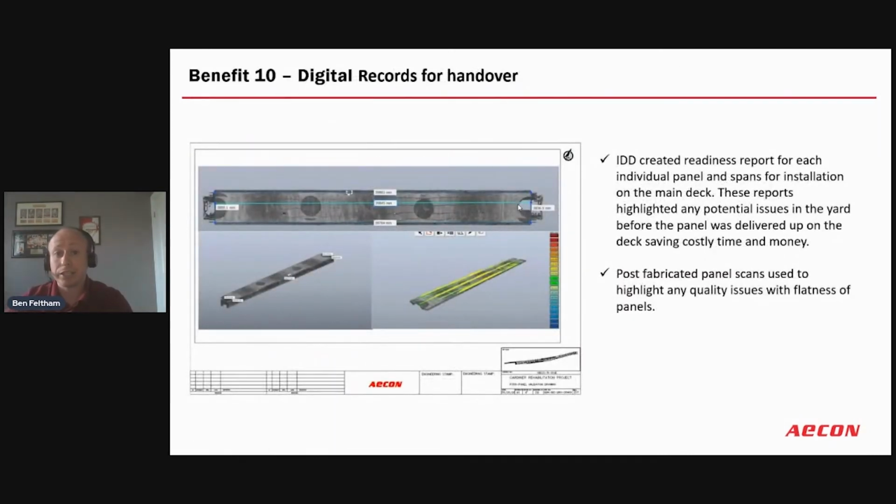And then the validation. I still believe in producing a good drawing that comes from that data set, that's easy to understand, that's coded properly, that has everything it needs to be within that system in the right part of the workflow and fed to the right people as per the RACI matrix. So that really helped. It helped us build the handover package as we went, and that allowed us to really close out some non-conformances really quickly. And that was really, really powerful for the project team.